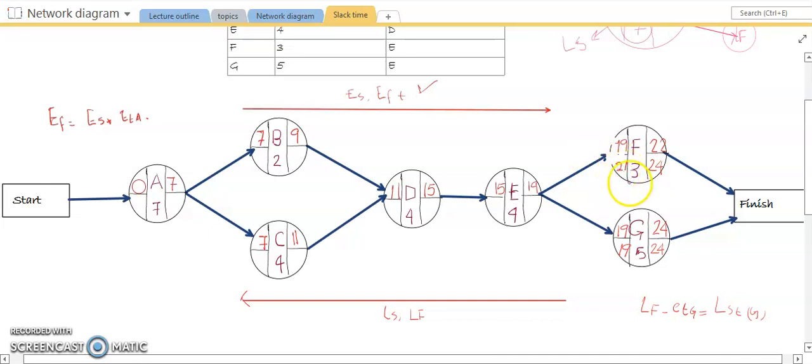So here comes the point to understand that again we have a similar situation to what we had with B and C activity, where we had to allocate the maximum value to D activity. But here it is reciprocal. Among both of the values of the latest start times, which are 21 and 19, we will always choose the time which is minimum in value. So which is 19.